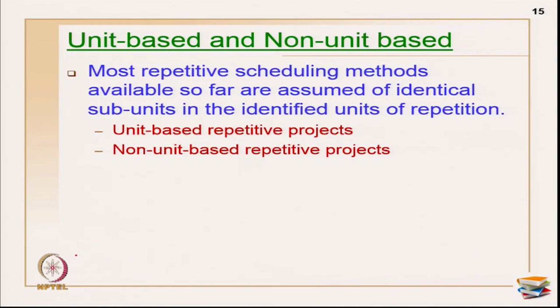Most repetitive scheduling methods available so far assume identical subunits and identified units of repetition. For example, let us assume I have an activity called excavation, subbase and so on. So, excavation may look the same for the entire stretch, maybe you are laying a pipeline of 240 kilometers or something, for the complete stretch of a highway, road or something.